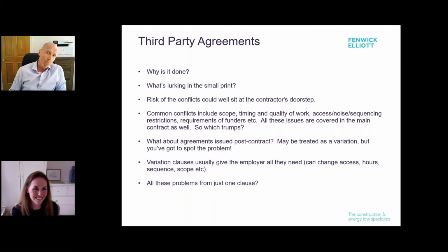In the same way that when an employer produces a set of ERs and sends it out to tender, and it comes back realizing that we can't afford anything we've asked for, rather than update all those tender documents to reflect all the VE solutions that contractors suggested, or alternative ways of doing things, or taking things out that the employer can't afford, what they do instead, of course, is have the classic schedule of clarifications or exclusions that just get stapled onto the back of the ERs. What that does is save an awful lot of time with the design team and everyone else updating the documents.